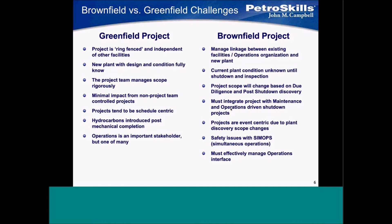Current plant condition is unknown. How many times have we thought this heat exchanger or vessel is in pretty good shape — that's what the last inspection showed — and then you open it up and it's a mess? A lot of times you won't find out until you open something up.